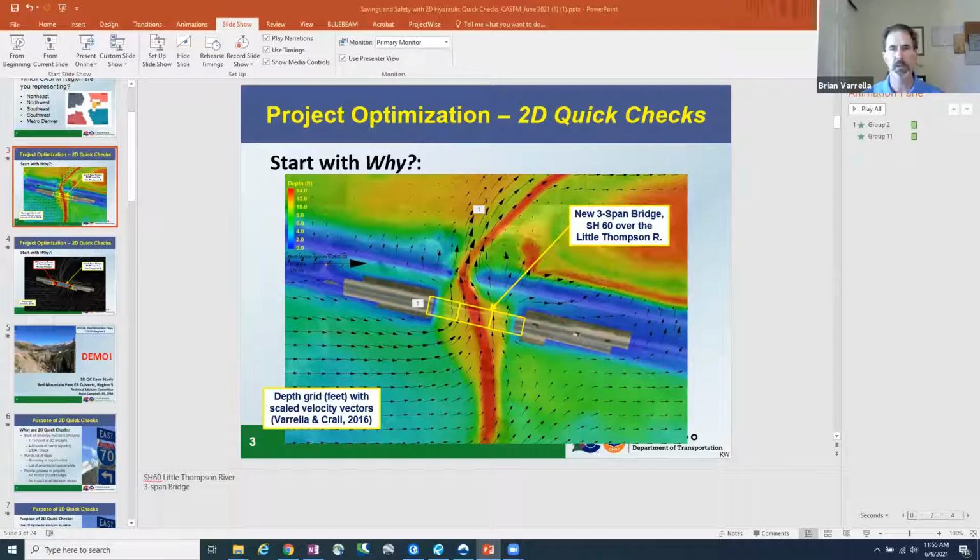I said, yeah. So we went to the RTD, Johnny Olson at the time, and said, if we can do a 6-inch overlay in here for $500,000 on a $12 million project, we can have a safe corridor between US Highway 85 and Interstate 25 to move emergency service personnel with our new bridge. I said, the new bridge is out of the water, but the approach to the south is not. And Johnny said, so you tell me if we're doing a 6-inch overlay for another $500,000, we can have an emergency access corridor? I said, yeah, that's all it takes. He's like, done.